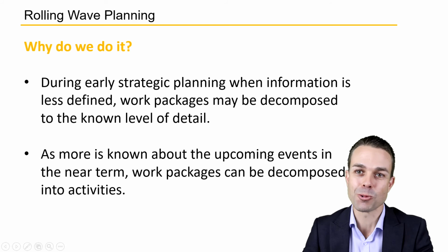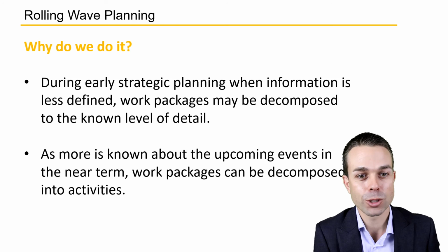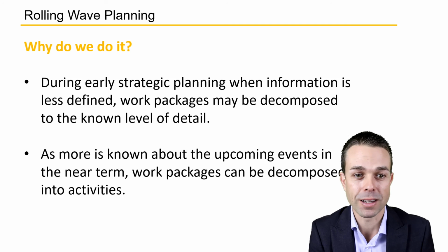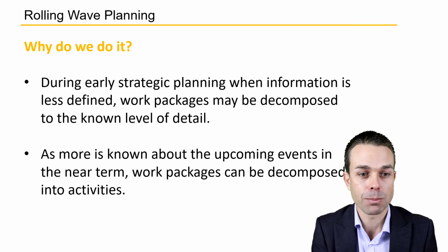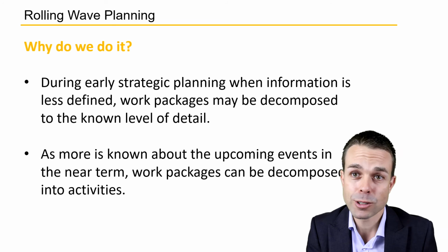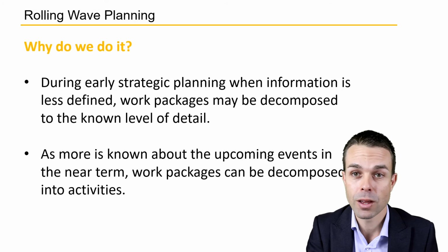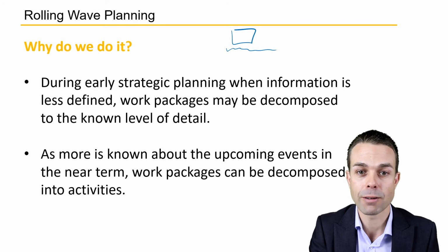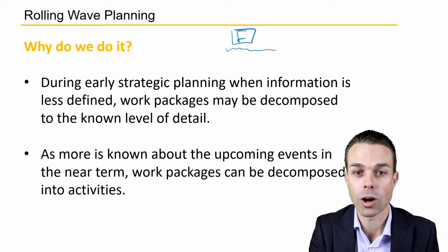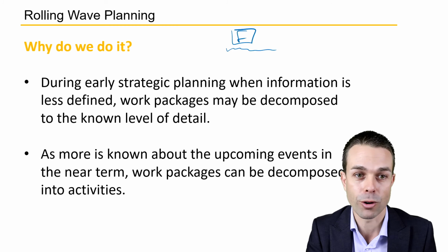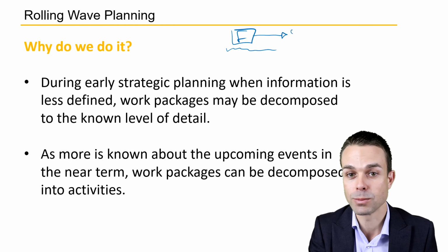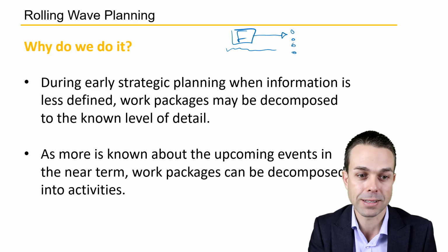So why do we do rolling wave planning? Well, it's during our early strategic planning, when information is less defined, work packages may be decomposed to the known level of detail. When we're first doing a project charter, for example, we don't know all of the nitty-gritty detail. So we might have to start with a high-level feature or a high-level idea and work from there. And then as we get closer to working on those items in more detail, then we break it down.